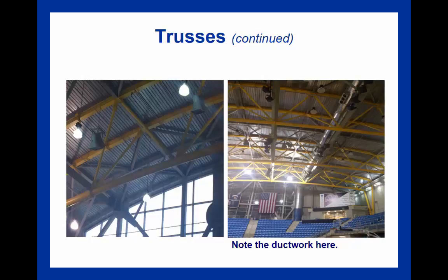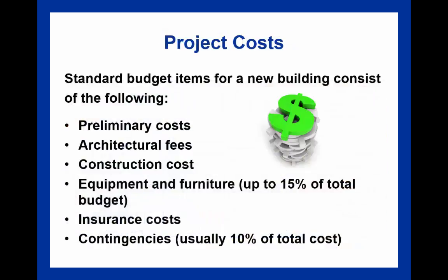When you're dealing with a building that is maybe historic or older, things like restoration and renovation might be required, and that could be even more expensive than construction because of the historic nature of the facility. Some aspects when you're talking about restoration and renovation are dealing with health concerns such as asbestos or lead paint due to the historic nature, how that renovation will impact existing tenants, and whether time will be available to actually make that renovation. The textbook references renovations at Soldier Field as the example.